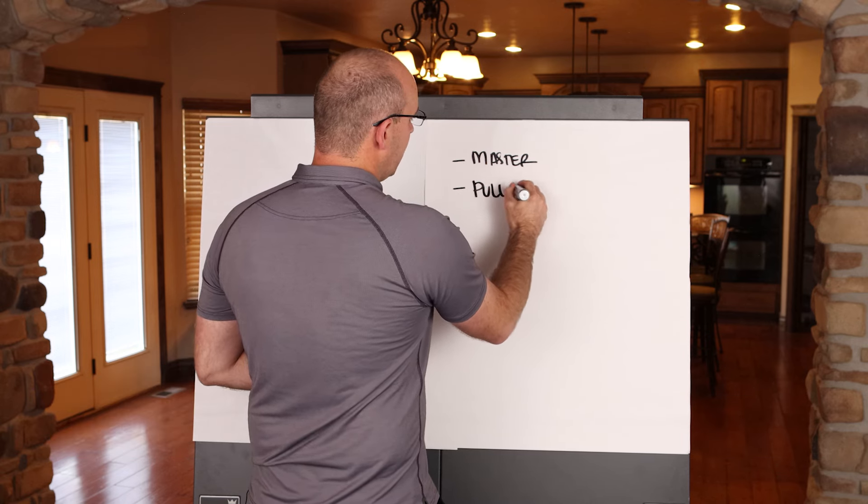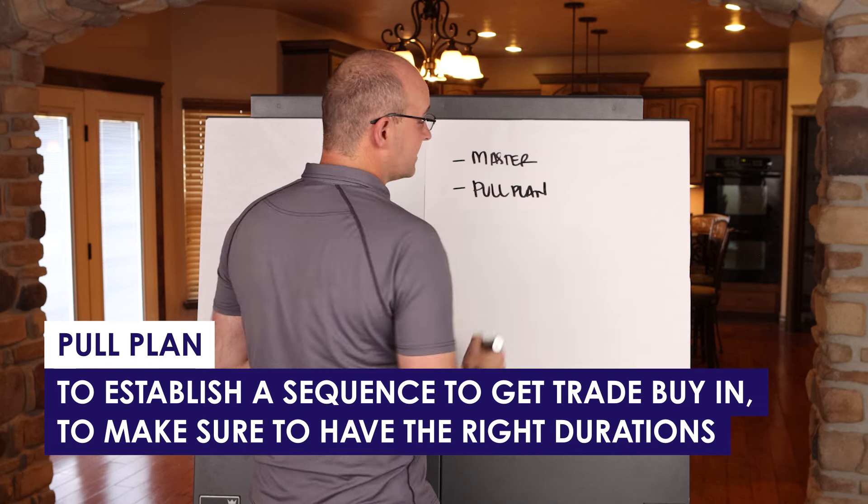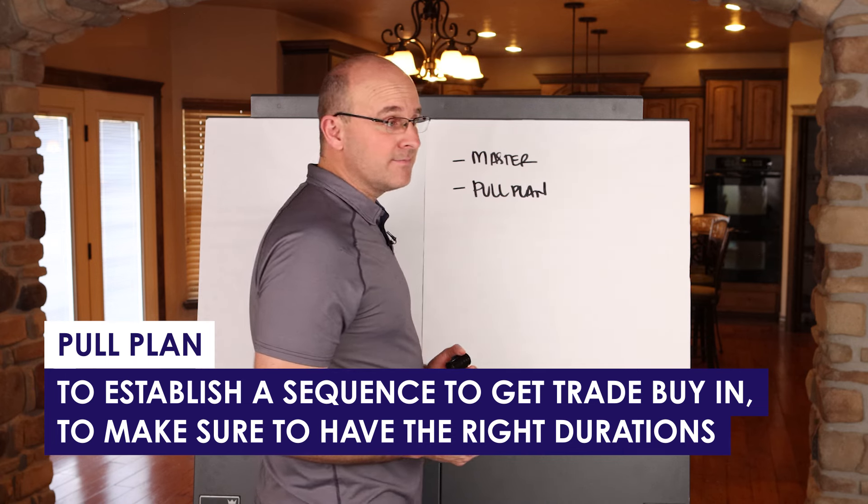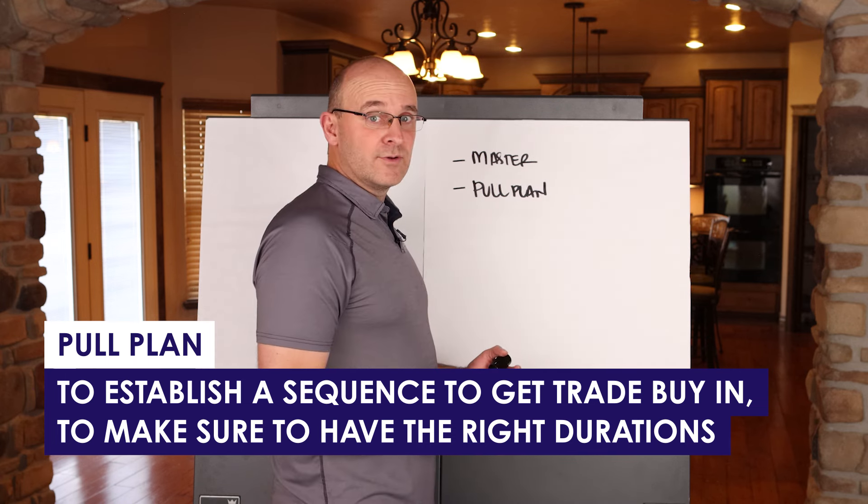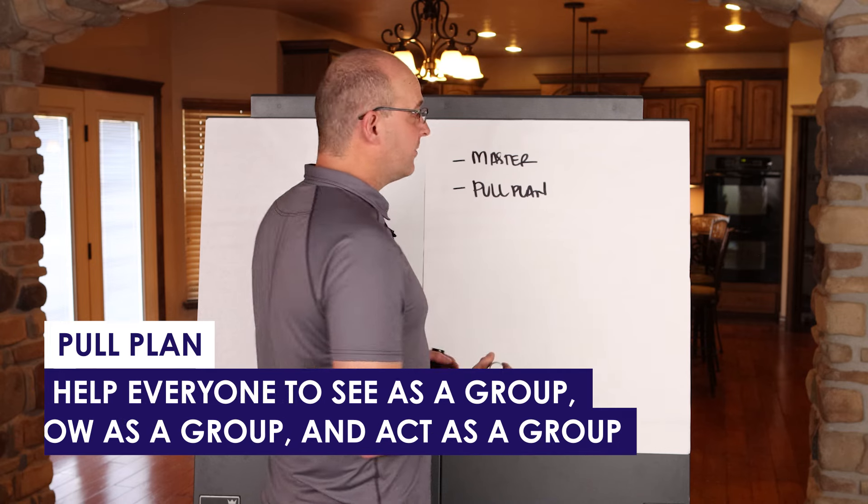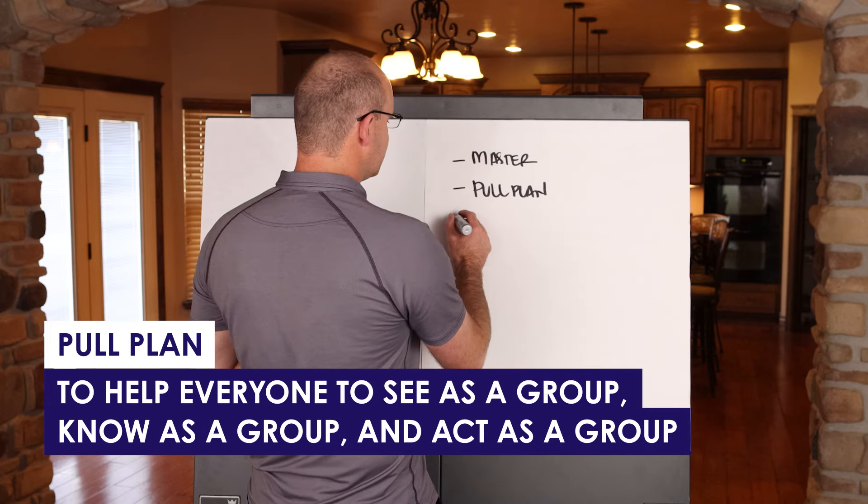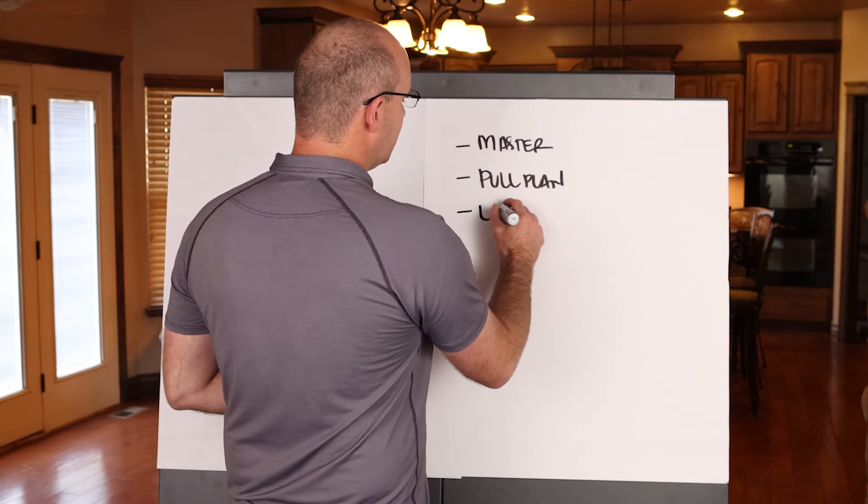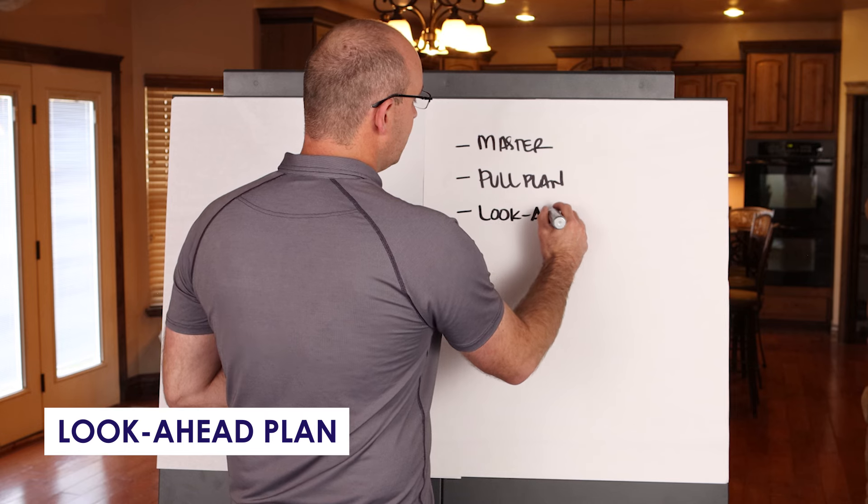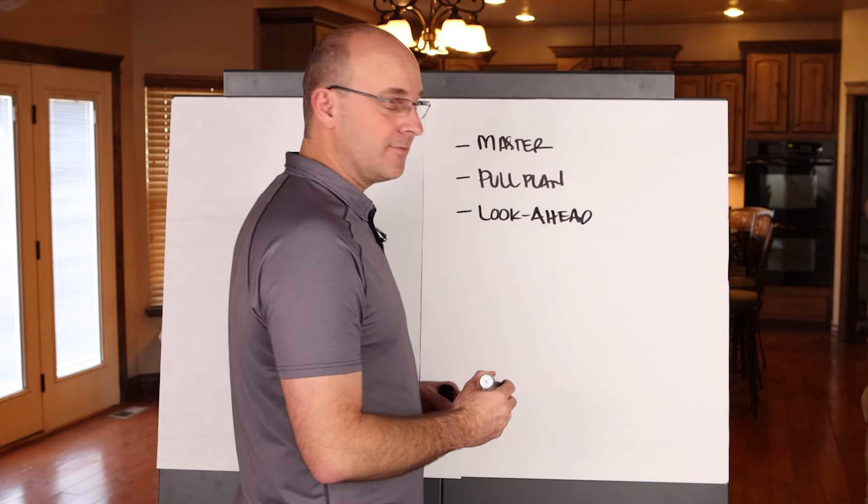Then the pull plan, and the pull plan is to establish a sequence, to get trade buy-in, to make sure that we have the right durations, and to really help everyone to see as a group, know as a group, and act as a group. Once we have that, we have the look ahead, which we will talk about in other videos.